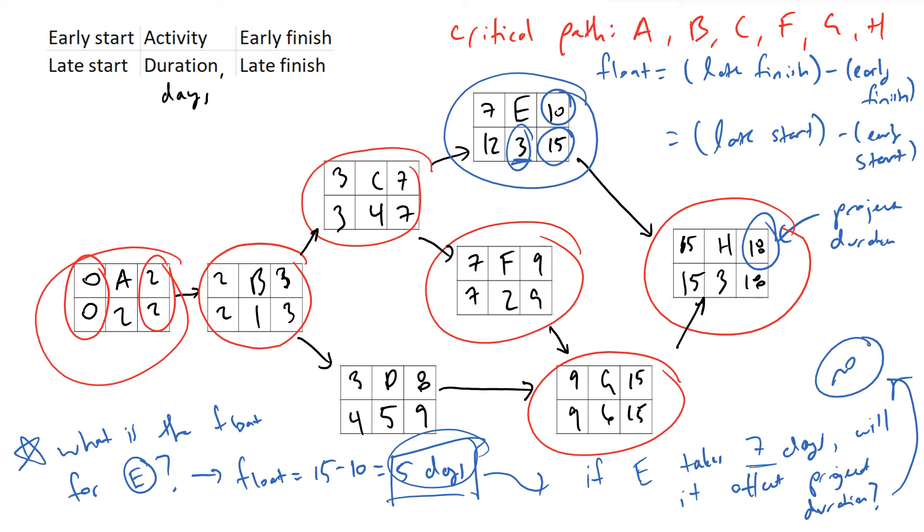And then what you will see, again to reiterate, is that on your critical path, all activities on critical path have float equal to zero.